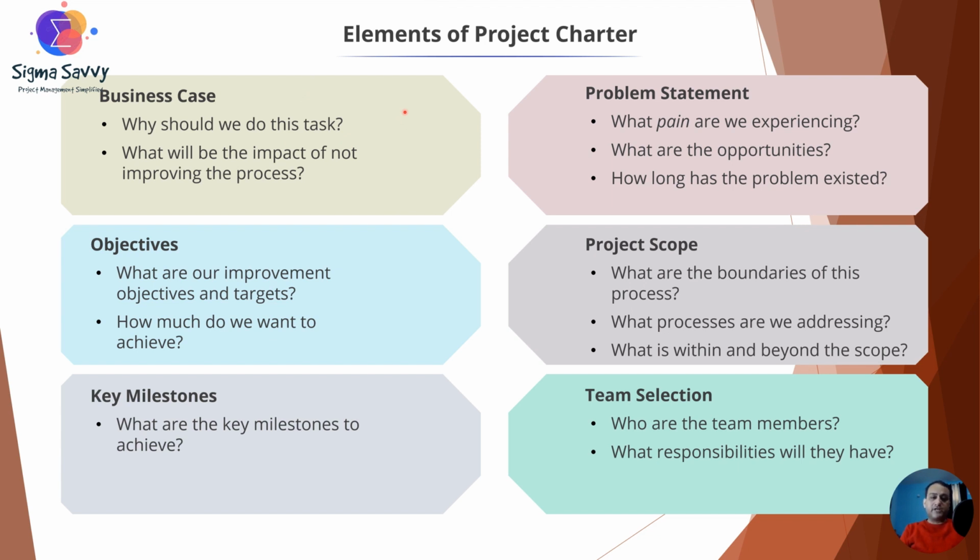value that the project will deliver to the organization and the stakeholders, the alternatives and options that were considered and why they were rejected or selected, the cost and risk associated with the project and how they will be managed during the course of the project, the assumptions and constraints that affect the project feasibility and the viability.